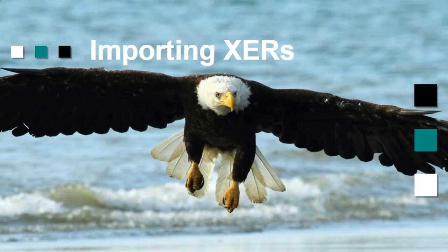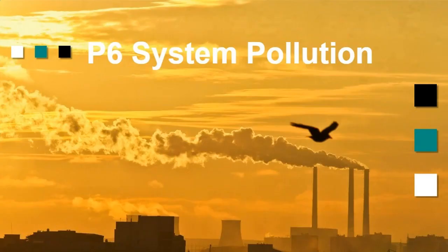So what we tried to do here with P6-Scrubber is to try and give you an easier, better, more reliable technique to take an XCR, clean it up, scrub it up, and then bring it into your P6 production and make that a lot easier. Because of course, we don't want our P6 to get polluted with all sorts of codes, user-defined fields, calendars that we don't want. And we don't want it to mess about or overwrite, if you will, some of our key fields and data that we need, especially for corporate reporting.